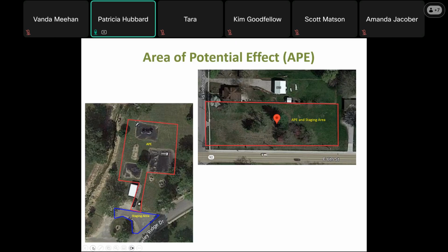Review the listed resources and identify any resources that may be significantly impacted by the action. Do not include short-term impacts as negative unless a federal permit is required to satisfy those impacts. The environmental review survey should be completed with professional input from resource experts and in consultation with relevant local, state, and federal governments as appropriate. Remember, the costs associated with hiring a firm or individual to complete your environmental review can be used as a pre-award cost. Just make sure to add it to your budget table, narrative, and question 74.